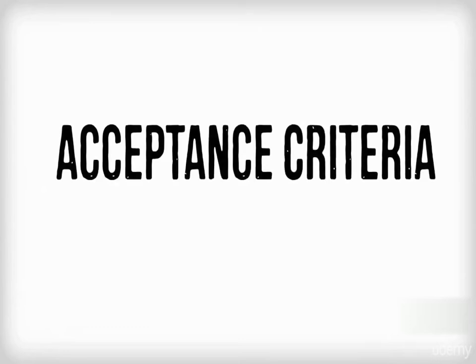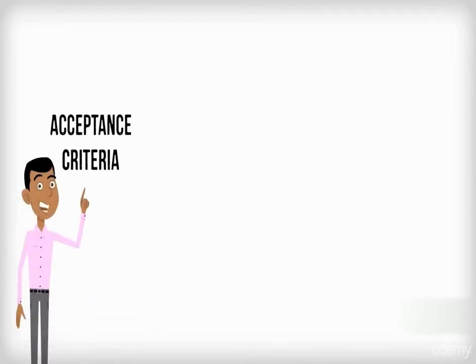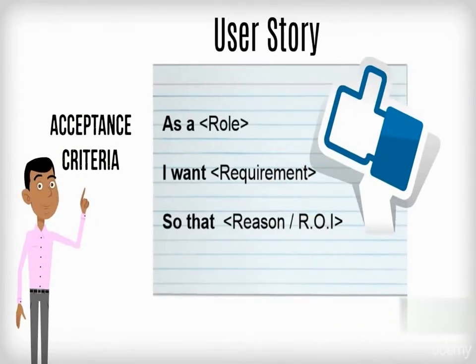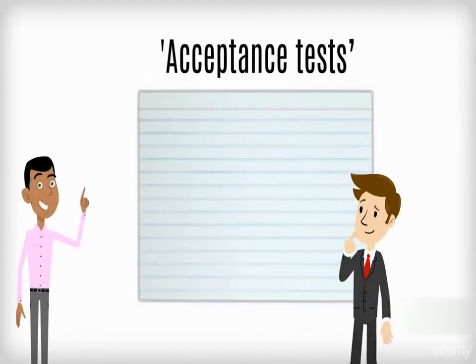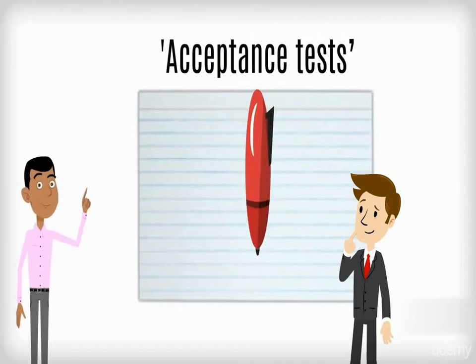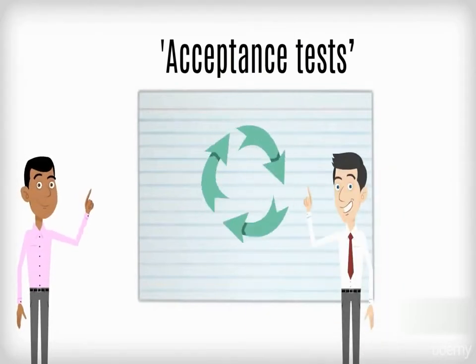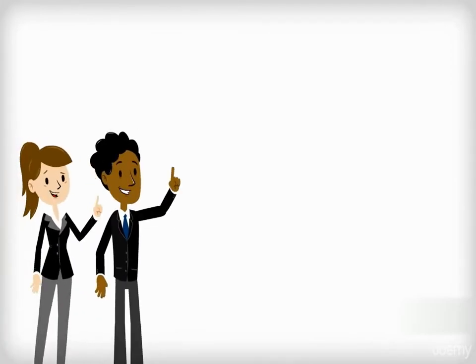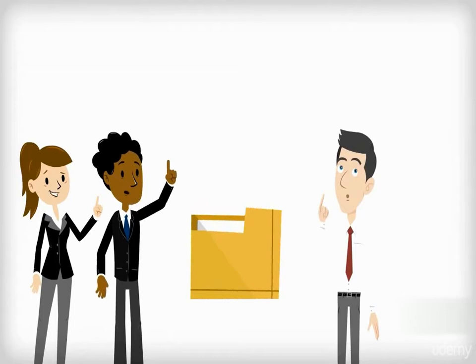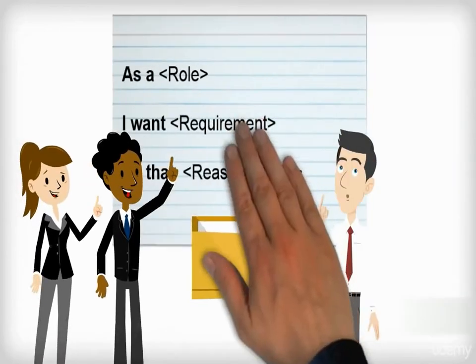Acceptance criteria. The purpose of acceptance criteria is to articulate precisely when the user story is done from the product owner's perspective. They should translate into acceptance tests that a tester or quality assurance tester can use to verify the quality of a feature. A tester should be involved in writing them, but it is a product owner's responsibility to produce them. Agile business analysts are very helpful in assisting product owners and extracting the right information for user stories.